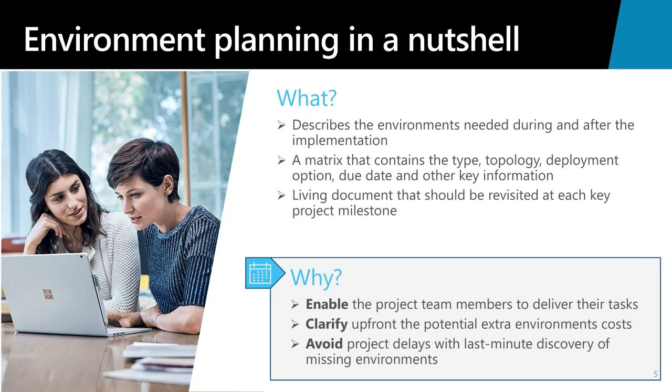It's not uncommon that, if you didn't plan for a performance testing environment or a training environment, that you figure these things out right at the end of your project or right as you're needing it. And getting new environments, procuring those licenses, getting them deployed, getting all the data configured in them can oftentimes be a time-consuming process. So that's another reason why it's really important to make sure that we're taking a look at these environment plans at the beginning and then revisiting them throughout your project at the key milestones.